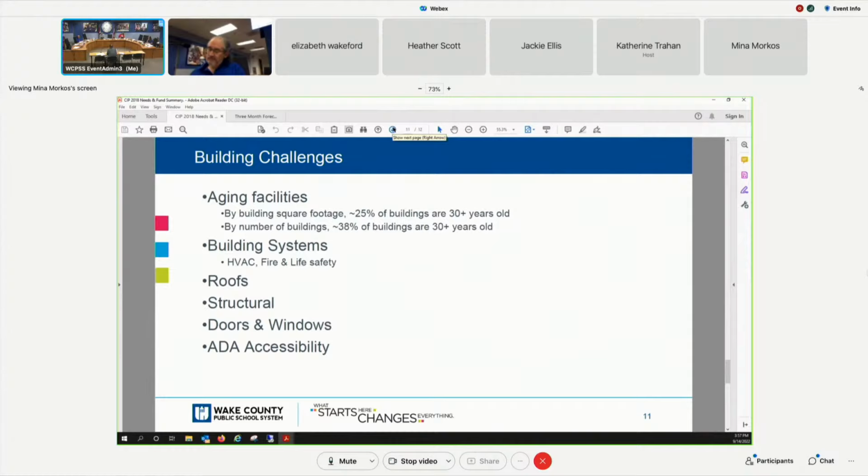Okay. I was just thinking in terms of which schools are grandfathered and which weren't, which ones were completed before 92 and which ones might have been in the planning stages. I just didn't know who would get the grandfathering and who wouldn't. Right. But all of those that are 30-plus years old would have been grandfathered. So none of them would currently have ADA. Right. So any renovations to those schools would be more extensive because it's coming up to code.